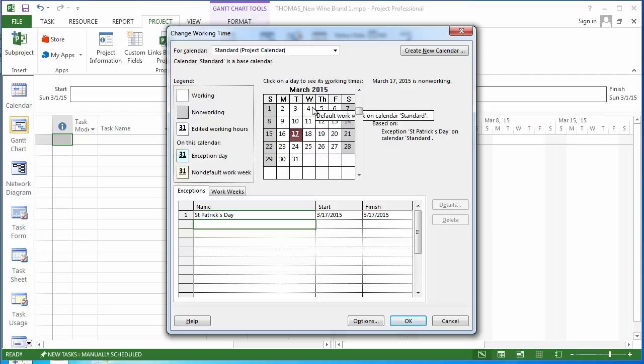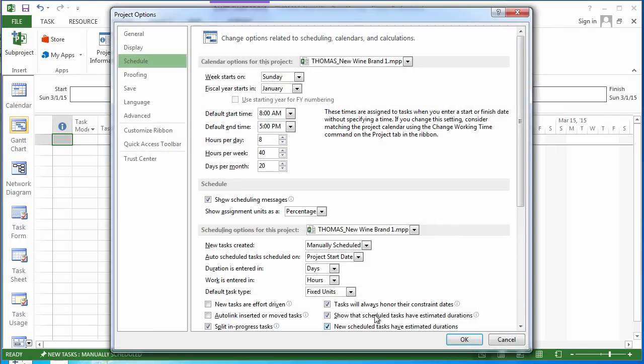By default, it only allows working from 9 to 5 Monday through Friday. So if there are holidays, you need to make sure they're set as non-working and grayed out so that you get more accurate estimates of when things can get done. And that's exactly what we're doing right here. In a larger company, this actually could be a standard enterprise calendar that automatically connects into your Microsoft project.